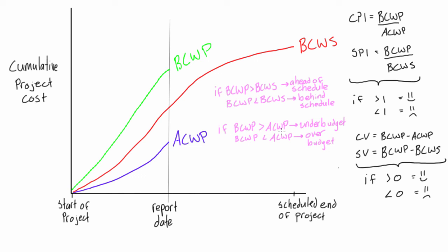For example, if BCWP is $4,000 and ACWP is $2,000, then CPI = 4000 / 2000 = 2, which is greater than one, so we're under budget. If those values were switched, CPI would be 0.5, indicating the project is over budget. The same logic applies to SPI when comparing BCWP and BCWS.